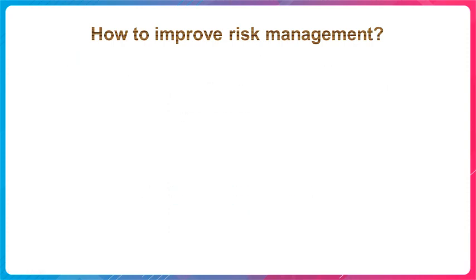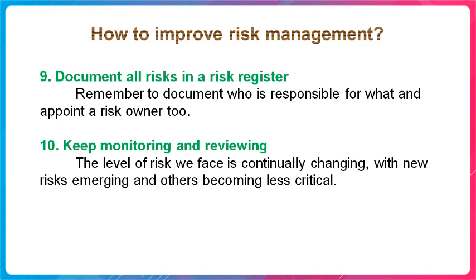Ninth, document all risk in a risk register. By capturing all risk across the company, you will be able to see the bigger picture of your entire risk exposure, which will improve your information sharing and accountability. Remember to document who is responsible for what and appoint a risk owner too.